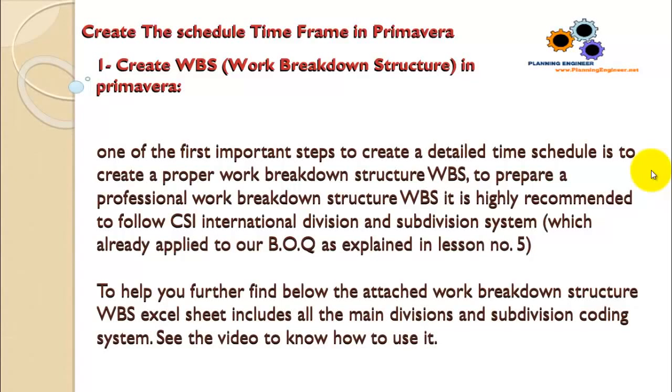Lesson number 6, video number 1, create WBS work breakdown structure in Primavera. One of the first important steps to create a detailed time schedule is to create a proper work breakdown structure, WBS. To prepare a professional WBS, it is highly recommended to follow the CSI International Division and Subdivision System, which was already applied to our bill of quantity as explained in lesson number 5.